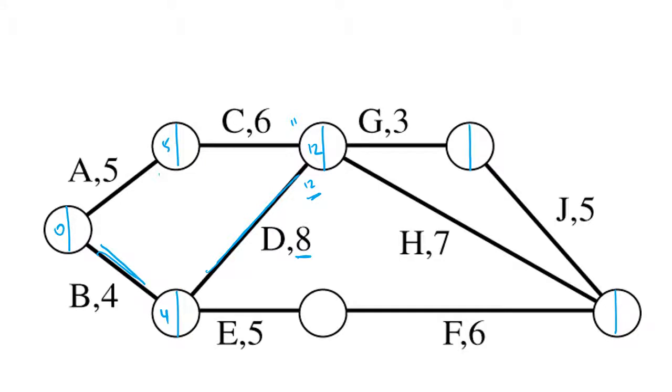Now let's continue. So 12 and 3 make 15. There's only one thing into there. And now I'm into the final part of my network. I'm going to list what comes in to the final node. So 15 and 5 is 20. 12 and 7 is 19. And is that a 9? That must be a 9. 4 and 5 is 9. I'll correct that better. That's a 9. 9 and 6 make 15. I choose the bigger number because if I delay that, I delay the whole activity.